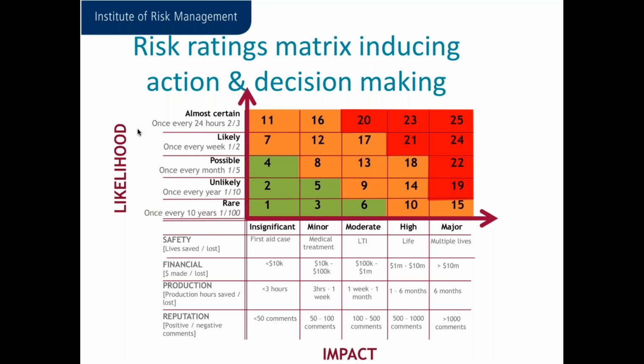Just a quick note here, another way to inject a little bit more objectivity, and something I've alluded to in other slides earlier and discussions we've had, is to actually try to score in a group. This is often done in most organisations, and actually I usually rate risks in the same session as risks have been identified, because you have all the key people there together anyway, whether that's face-to-face or virtually. If you don't do that, then you would probably have to have maybe a separate rating meeting, or you can send out the scores decided by the risk owner, and perhaps get some experts to review that.